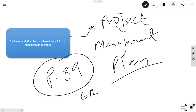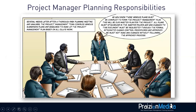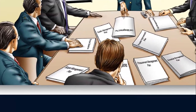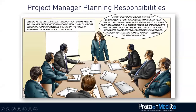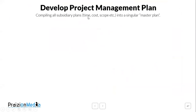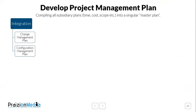Think about it being like this: you have a project manager working with a group of individuals — a team. Each area of the project has its own plan: a scope management plan, a cost management plan, a procurement management plan, a schedule management plan, and so forth. Integration covers how a project will change if it needs to, including what checks and balances it will go through. The configuration management plan addresses configurable items such as sub-deliverables, entire deliverables, and how we will version-control drawings and other documents.